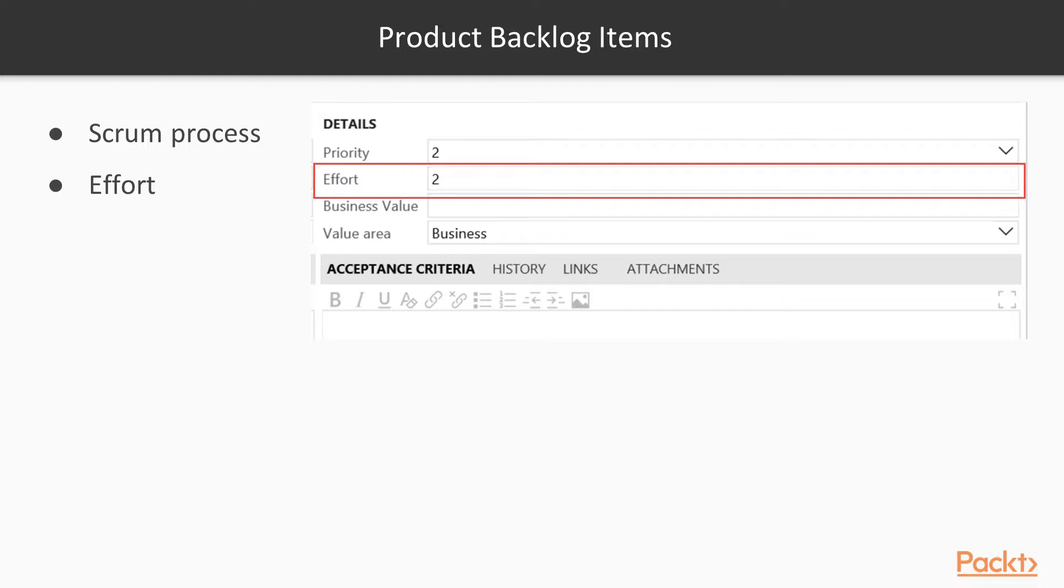So they'll set up the hours as like 3 hours equal 1 effort. Or 8 hours equal 2 effort. And so on and so forth. So we have a way to actually set up Fibonacci sequence or some way to set up effort that we're going to have. And this tells the team about how big this product backlog item is.